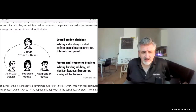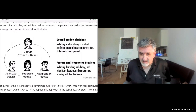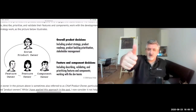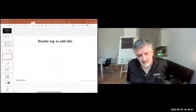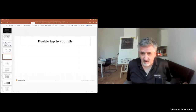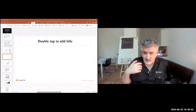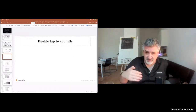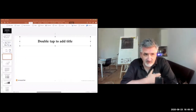Another point from experience: I moved away from having just demos in sprint reviews, because when I do demos I just have my customer come along and say 'oh, that's fine' — giving a thumbs up or thumbs down, which brings no real feedback. With some of my teams, we changed the review meeting to a user acceptance testing moment on a small chunk of work the team delivered during the sprint. They're testing in front of the computer with the team alongside, so the team understands the customer or users much better. What do you think about this approach?